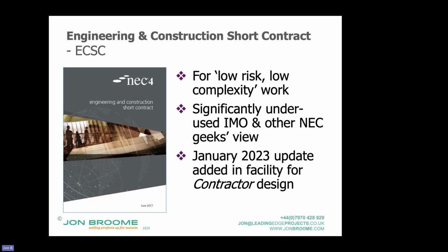I'm going to try and answer this quickly because you've obviously got a question, but it's not all we're talking about. All the contracts start with the parties, the project manager, the supervisor, shall act as stated in this contract and in a spirit of mutual trust and cooperation. In legal interpretation, detail overrides generality. So most of the time, pretty much all of the time, it's what the specific clause says that really counts.